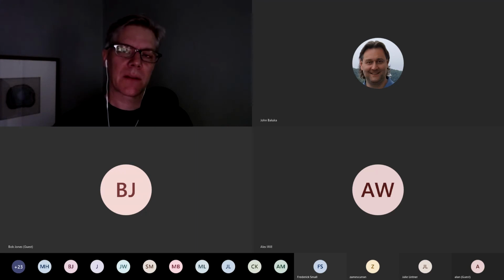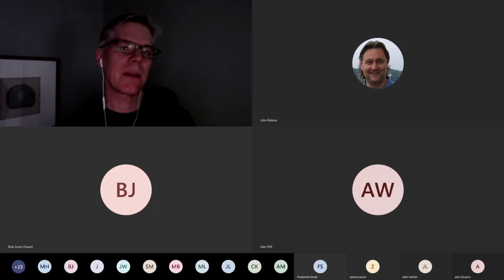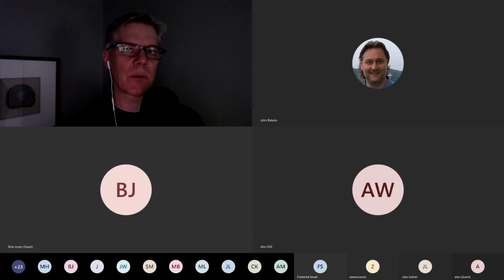And we believe that it's going to be $10,000, but that's just an estimate. So we charge this much per hour. We believe that it's going to take $10,000 worth of hours to complete this. And then here's the new thing. That's the normal thing. The new thing is, or we'll guarantee you that we'll finish all of this stuff for $18,500. So an 85% premium. Not quite double, but pretty close to double.